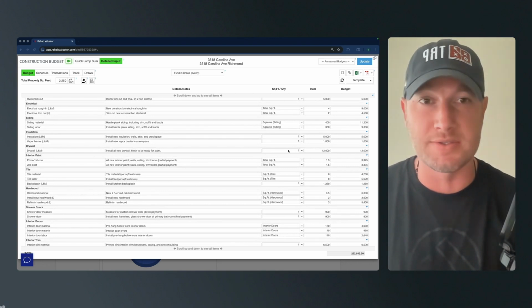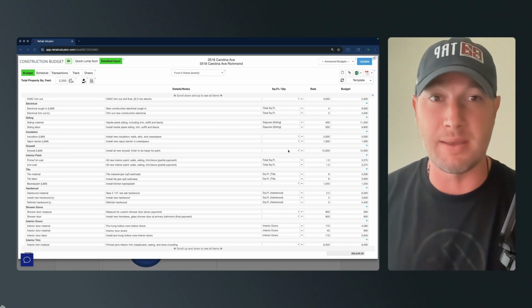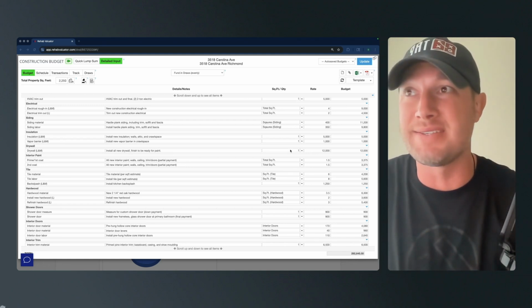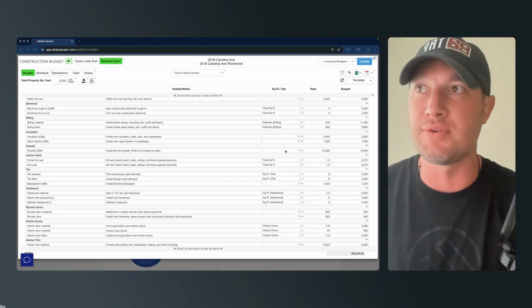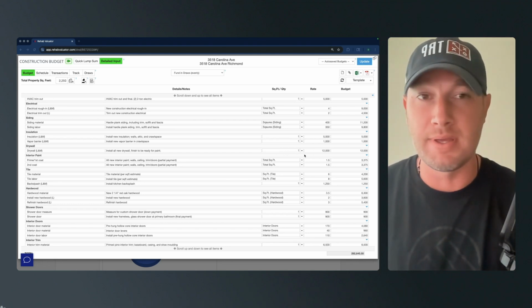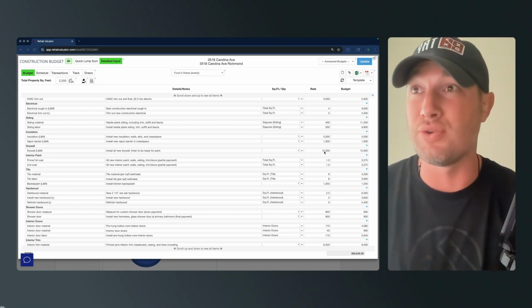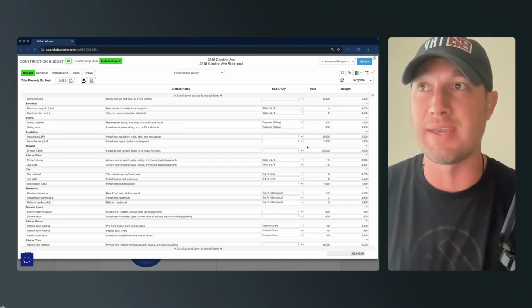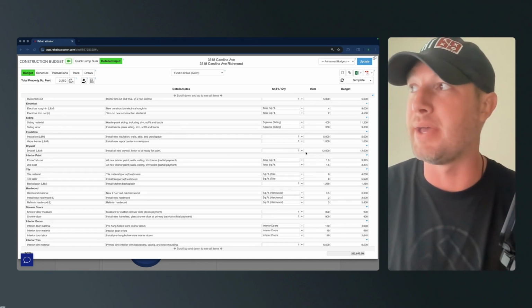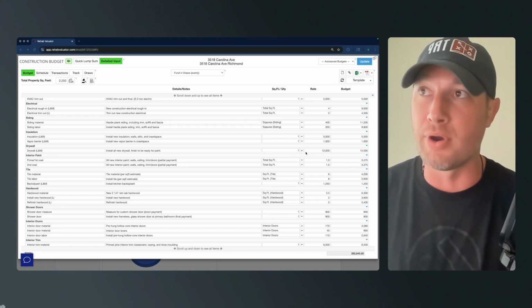A lot of drywall suppliers or installers are going to charge per board. As a matter of fact, I think they basically all do. But I like to estimate this by square footage too. Again, I dialed this back to a lump sum, just a custom value, one at 12,000. That is a huge number. I think I'm going to be very underneath that. That's something I've not got a bid on yet. But just know drywall is estimated or priced by board.